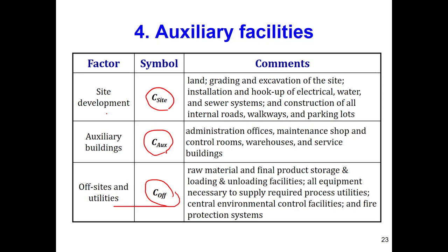So what is site development cost? It is the cost related to the land, grading of the site, excavations of the site, then installation of electrical light, water, sewer systems, construction of all the internal roads that we need, walkways, parking lots. So any cost that you need to pay to develop the site.